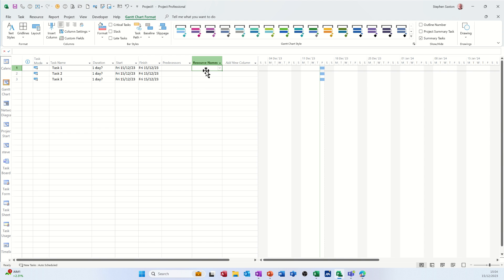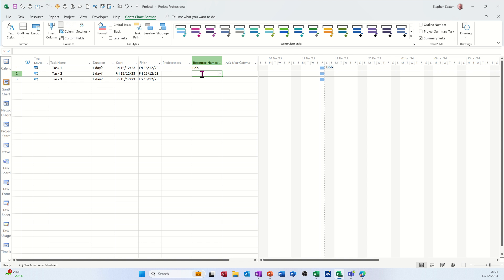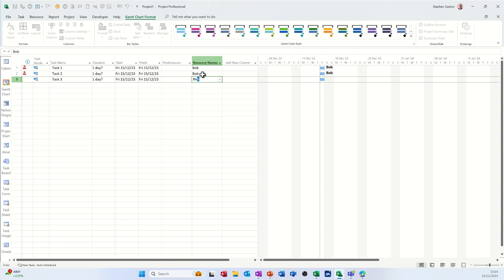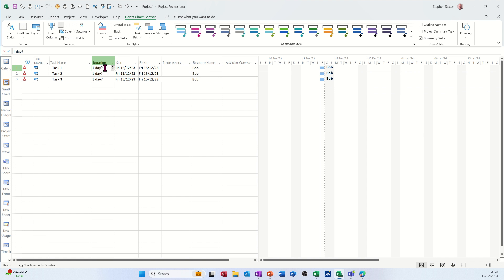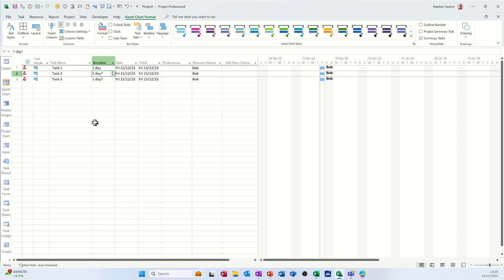So back to the Gantt chart. Now I'll allocate Bob to each of these. Just type it in, probably quicker. Okay, so he's over-allocated now. This is one day question mark, but if I just put that to one that will default to one day. However, if I put that to one...